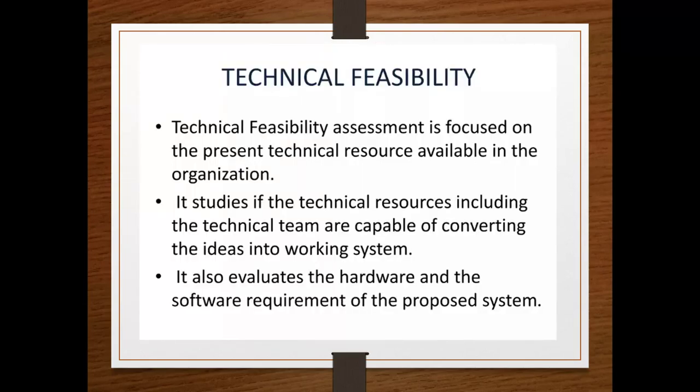The next term is technical feasibility. Here the main focus is on: do you have resources available in the organization? If a client comes to you and says, I want to develop a system in Fortran, a language which we normally don't use in the market now, do you have those resources available in your organization? You have to identify that.